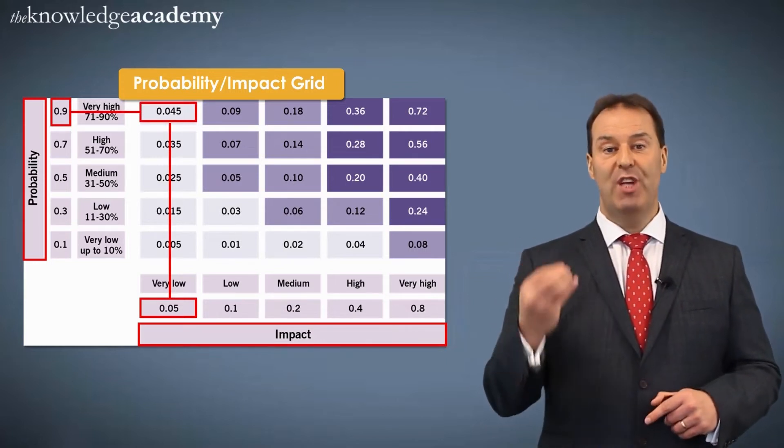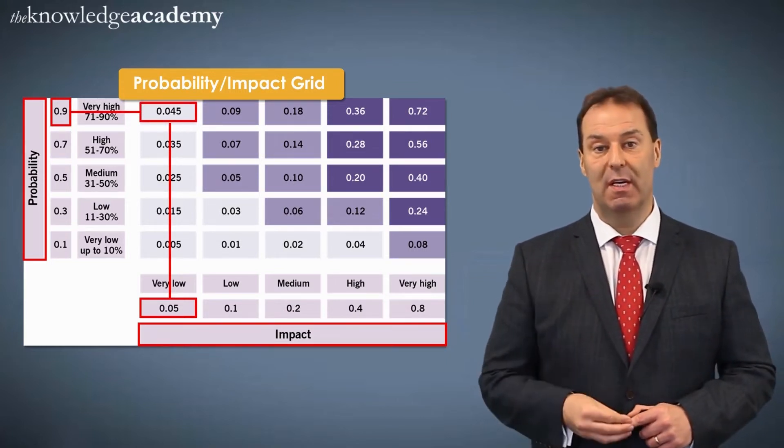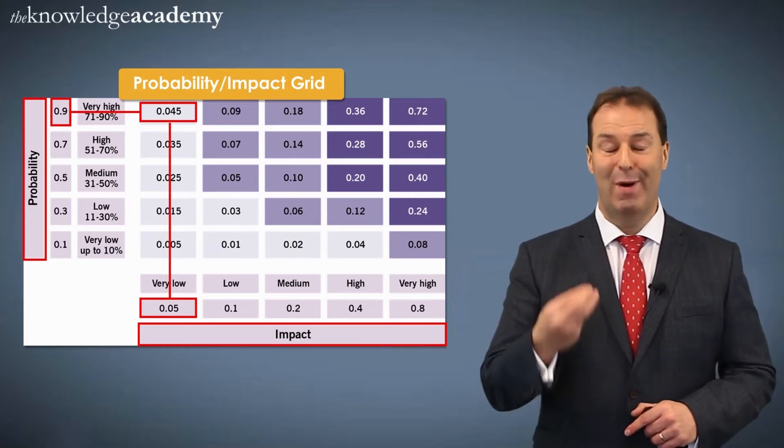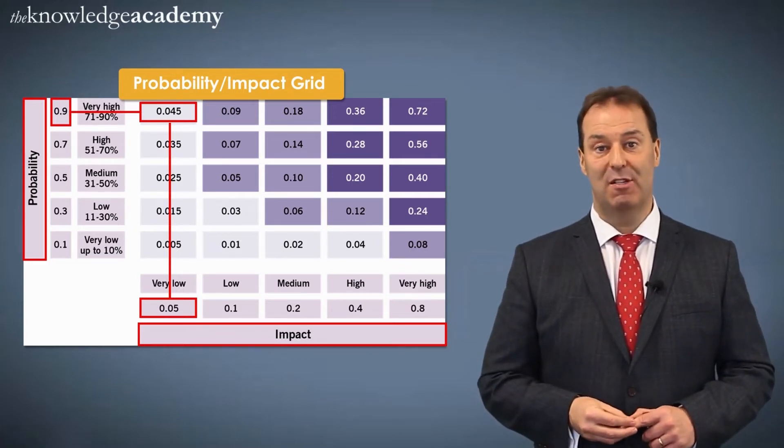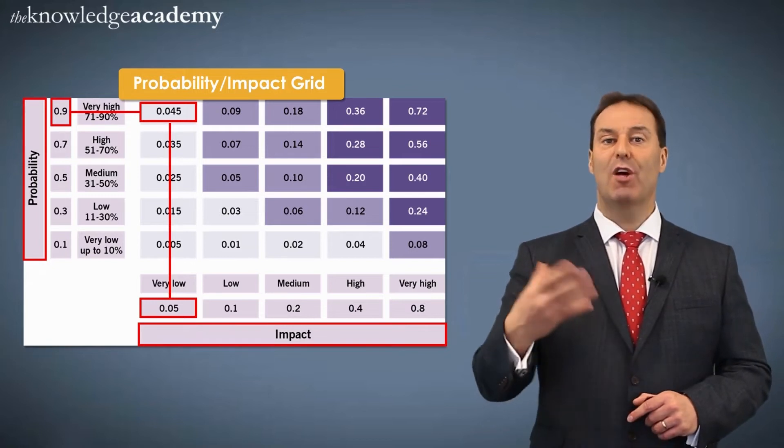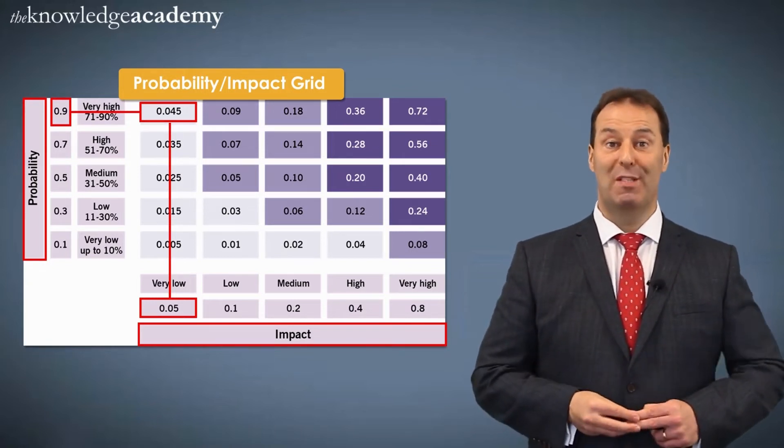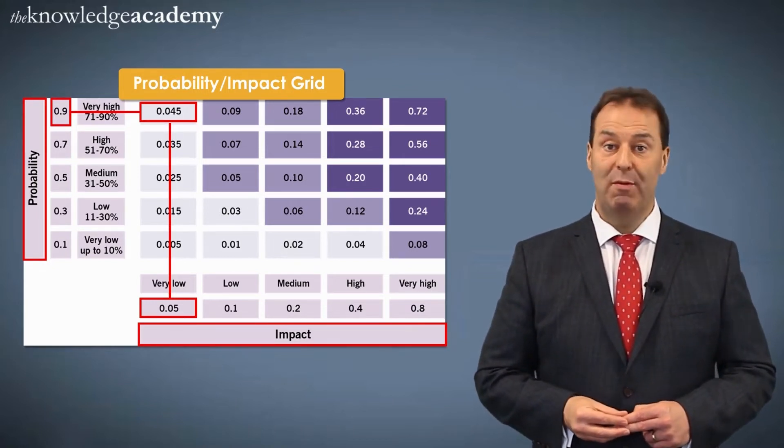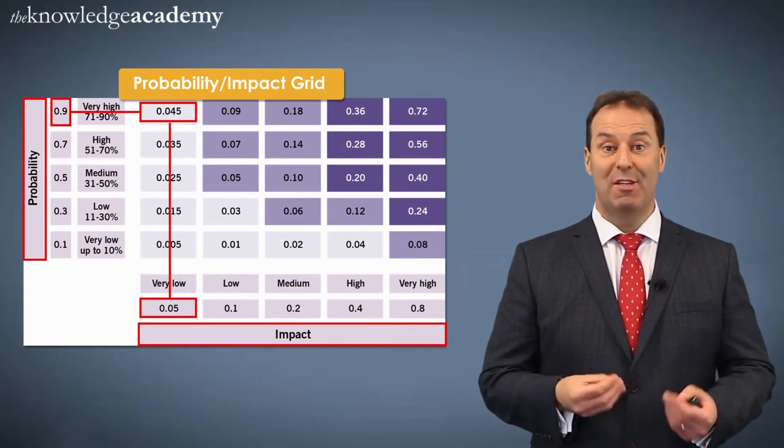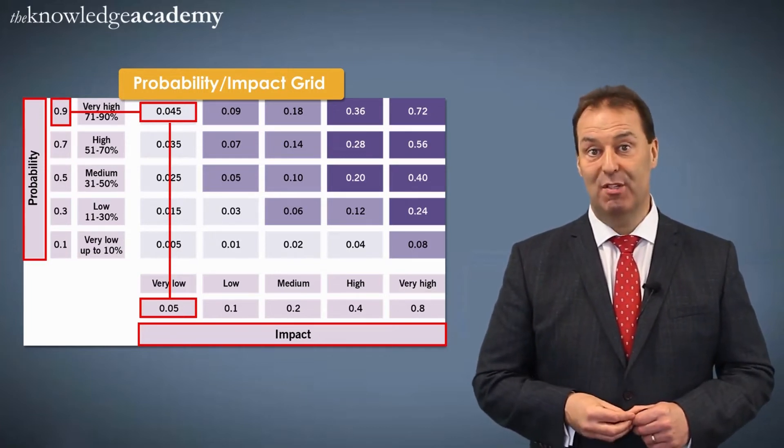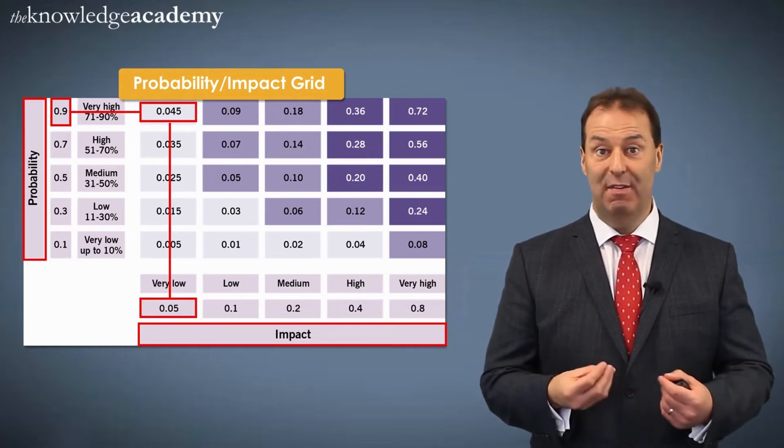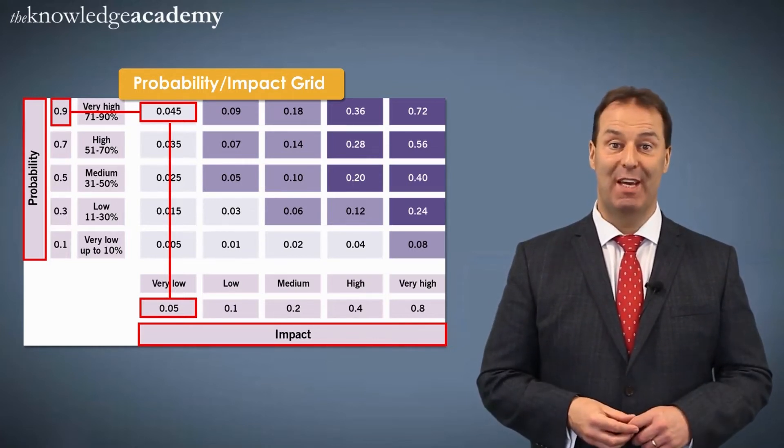The different shadings represent severity. The darker the shading, the more impact that risk potentially has. So the very dark shadings that you can see on this probability impact grid will probably result in the project manager having to escalate those risks to the next level of management for them to intervene to determine which action to take.